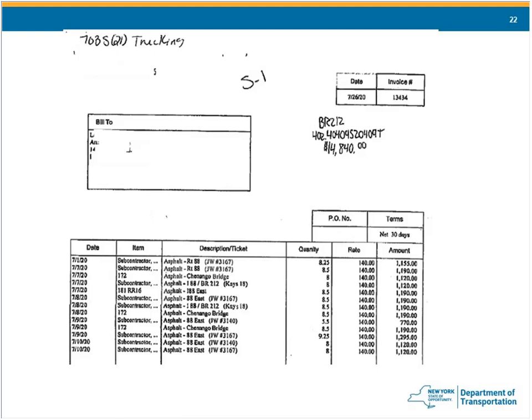And the EMR, from what I have gathered, was brought up by the AGC. It's part of the spec because I think the AGC wanted it to be part of the spec, and on the joint committees that we have with them, we decided to change it. If the contractor is giving you pushback, just direct them to the labor portion of 10905, and it's going to clearly state that the workers' comp insurance must be based on an EMR of 1.0.